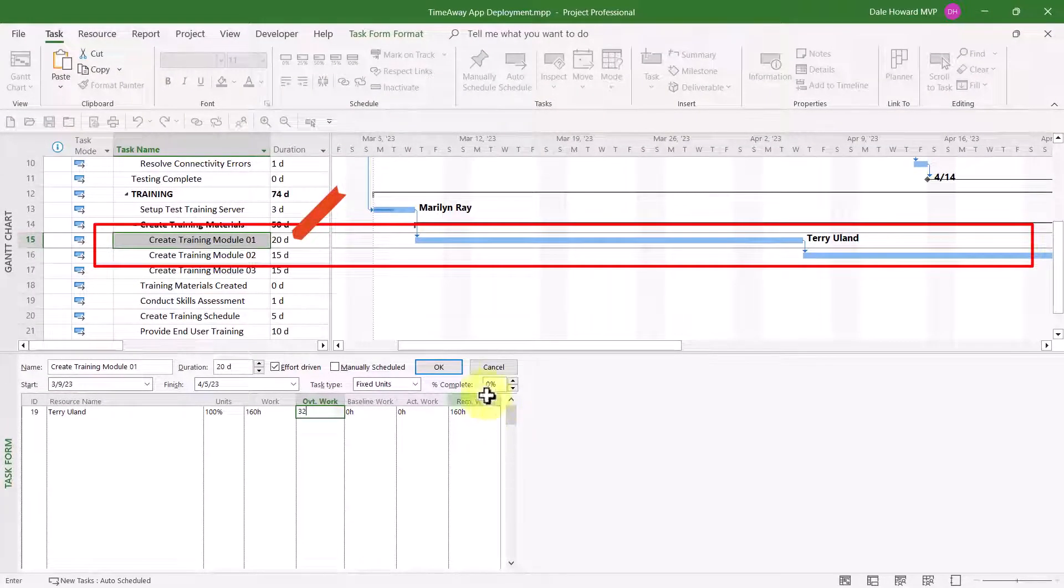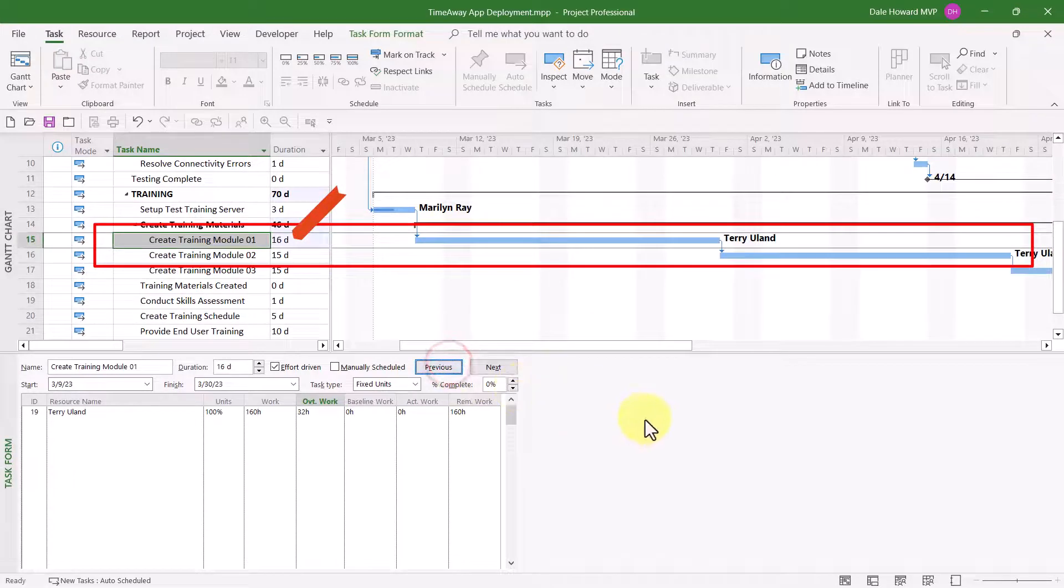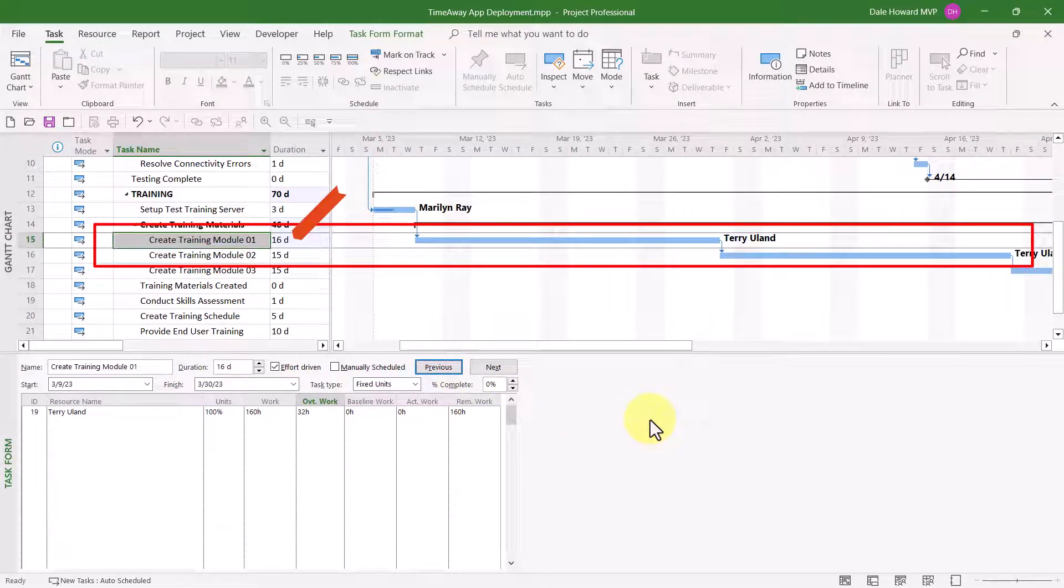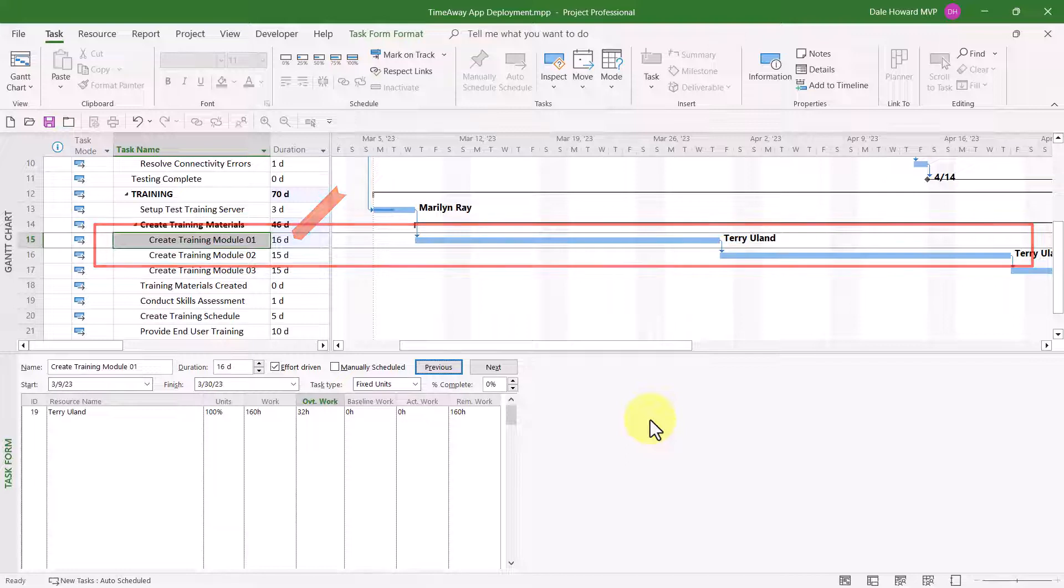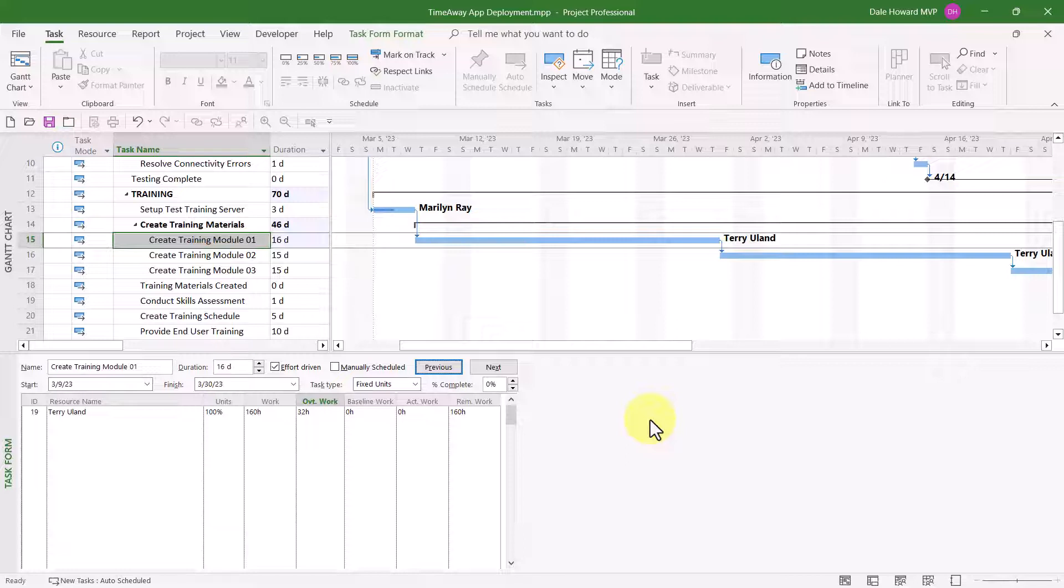When I click the OK button, Microsoft Project recalculates the duration as 16 days. Now, here's the way it works out. 160 hours of work will still be done, spread out over 16 days. 160 divided by 16 means Terry needs to work 10 hours per day on this task to get done earlier.